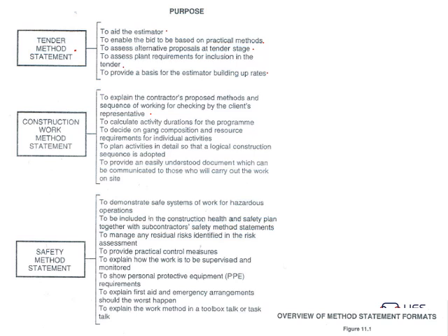So for instance, if you want to have a cold joint over your columns, so that if there's a joint and there's movement, it's on the column, so that both sides of the slabs, you can see there's two different slabs actually supported by the column underneath. So that's the type of rationale that you need to think of when you're preparing a method statement.